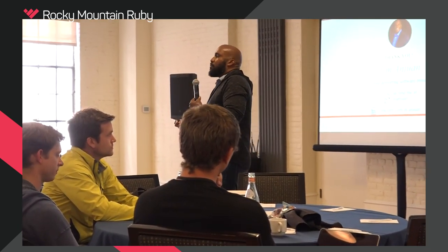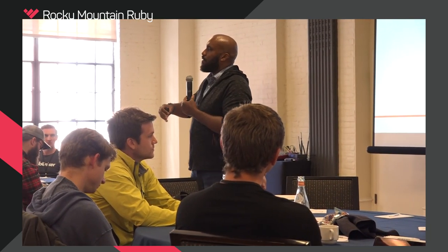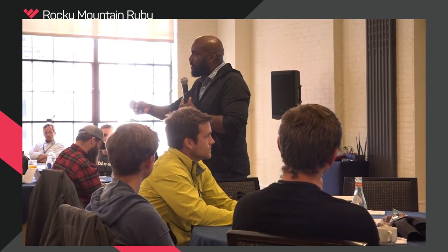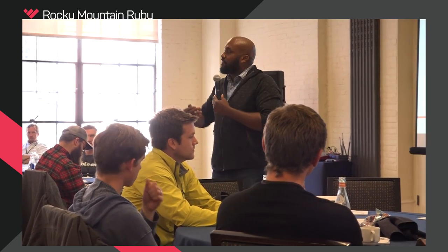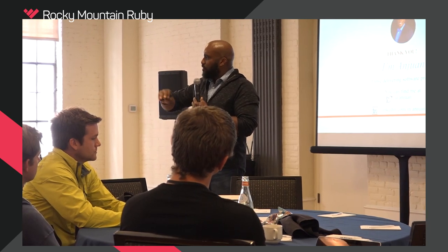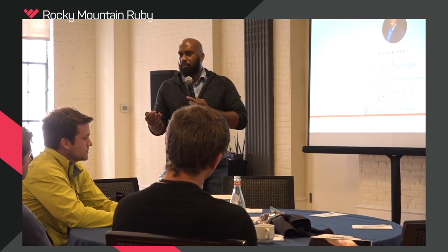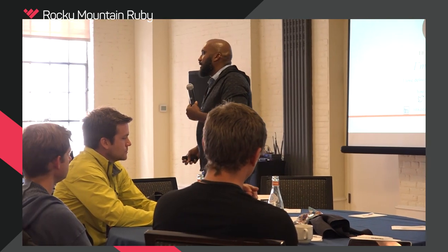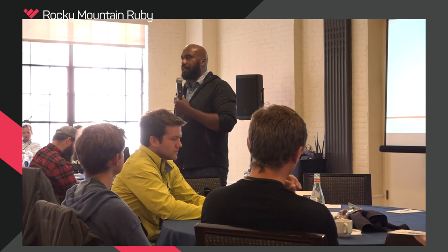And so, for example, if the product owner's new to the role, then I know that my role is going to be more product owner rather than just Scrum Master. And so I flex my role based on that. Or if the team is more junior than I think it probably needs to be, then I flex based on that. I say, well, let's try to lower the number of story points you're going to try to get done because of what's happening. And so if you're going to be especially an agile leader, then I think being flexible is very practical. And it actually leads to better results because you're able to respond to reality.